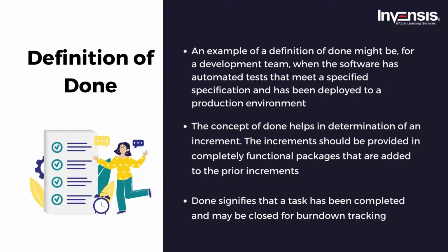The project should ideally be finished after each iteration. This is not always the case, though. Things arise that must be addressed, leading the project to pivot in order to quickly adapt to these changes. Therefore, it is not advisable to release after every sprint. To monitor the progress of the project, however, each feature must be completed inside the sprint. Therefore, completion involves ensuring that each feature has been completely developed, tested, and approved by the product owner. It is then and only then complete. This was about the definition of complete.